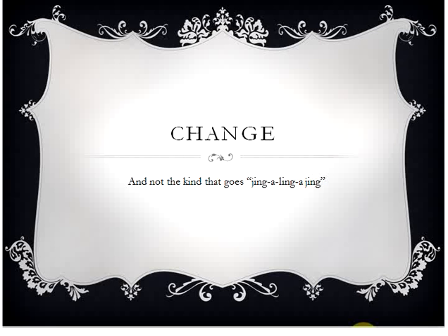The process I came from was a ticketing system where, once I, as the informatics analyst for the hospital, had heard everybody's pleas and requirements and wishes, and I felt I had appropriate information to present it, and I felt that the change technically was possible, and I felt I understood all the impacts to potentially some other places or other departments, then I could submit this ticket. During the change control meeting, that ticketing process would allow us to, throughout that week, make updates or comments or suggestions to that change to prepare us for the meeting.